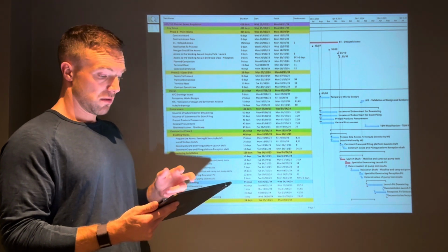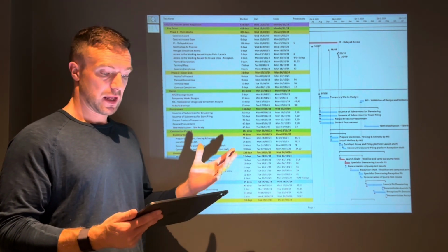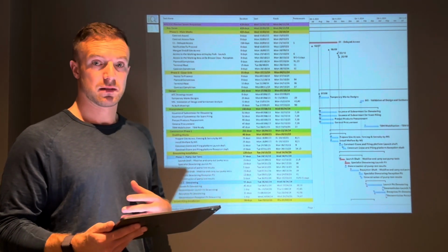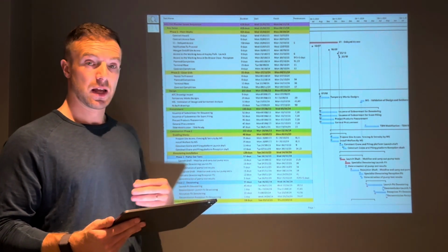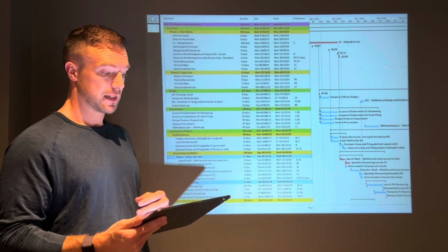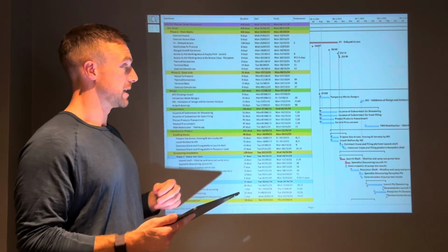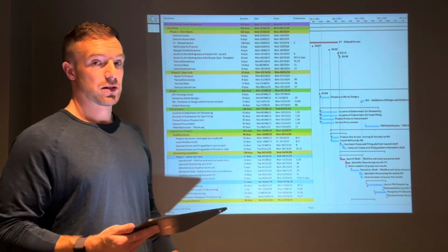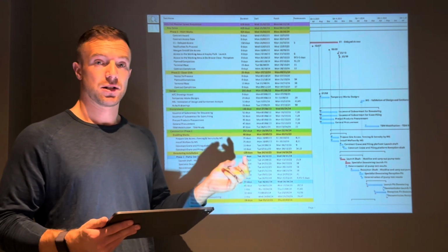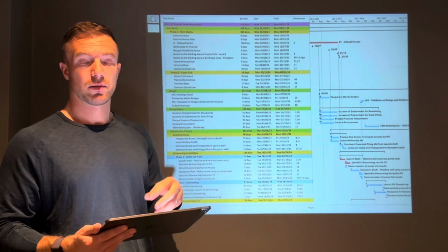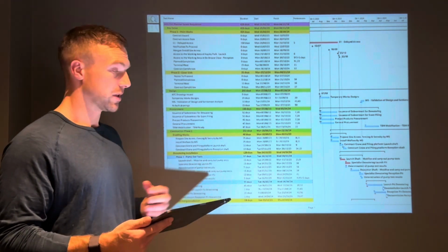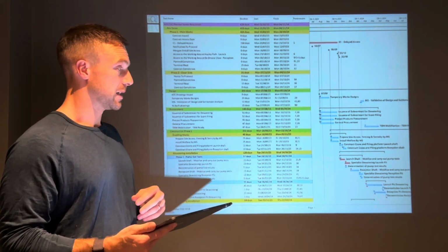So that's essentially what Microsoft Projects is used for. It allows you to input data, and it will give you an end date with all your durations added in. You can go into a lot more detail. You can add calendars, say 7-day working, you can put all bank holidays in, Christmas holidays in, etc. So quite useful in that sense.